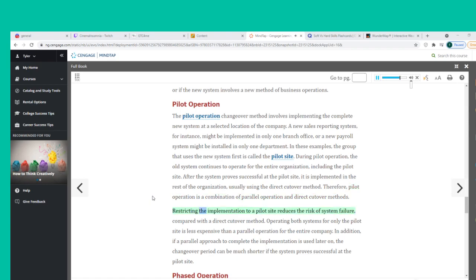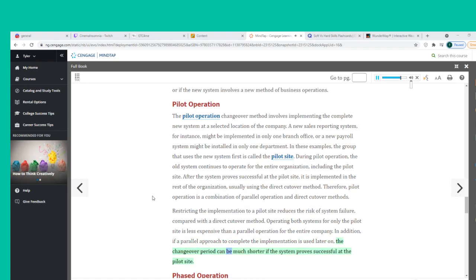Restricting the implementation to a pilot site reduces the risk of system failure compared with a direct cutover method. Operating both systems for only the pilot site is less expensive than a parallel operation for the entire company. If a parallel approach is used later to complete the implementation, the changeover period can be much shorter if the system proves successful at the pilot site.